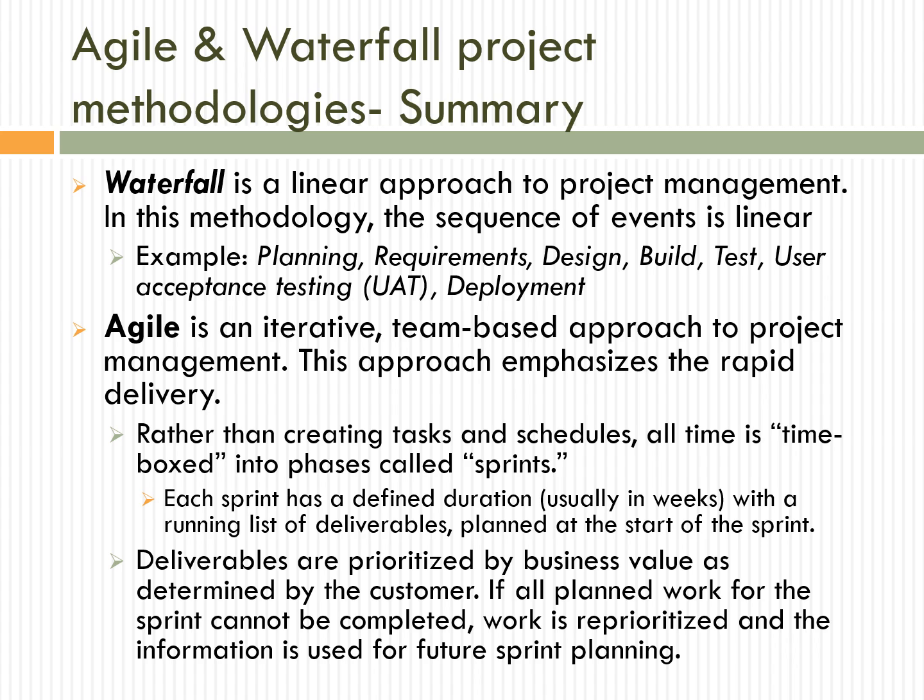Agile is an iterative approach. So this focuses on delivering smaller chunks of scope in a more rapid fashion. It's delivered in iterations or sprints. The iterations or sprints are usually 2 weeks in duration. I've seen them up to a month in duration. A month gets a little long. That almost feels like a project to me. But generally, it's about 2 weeks.